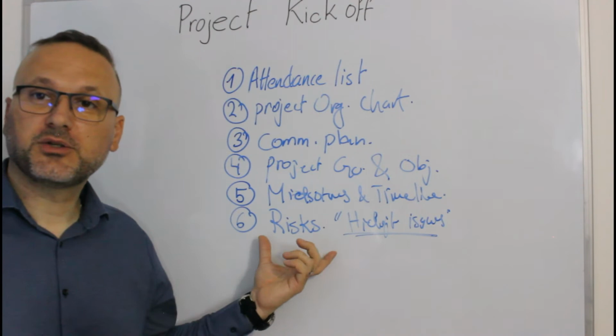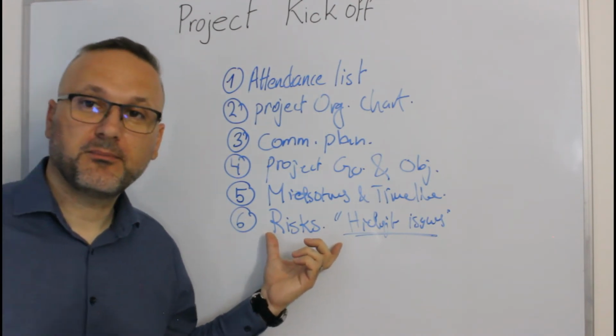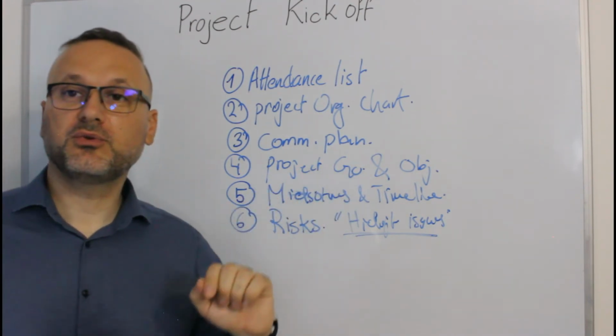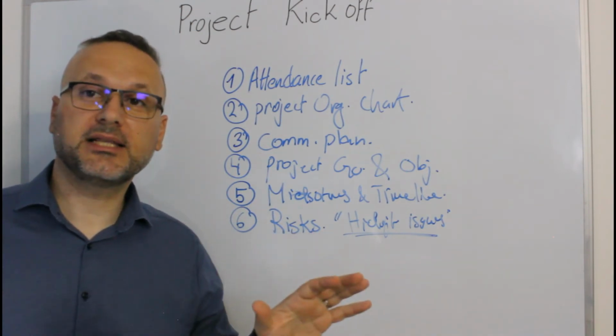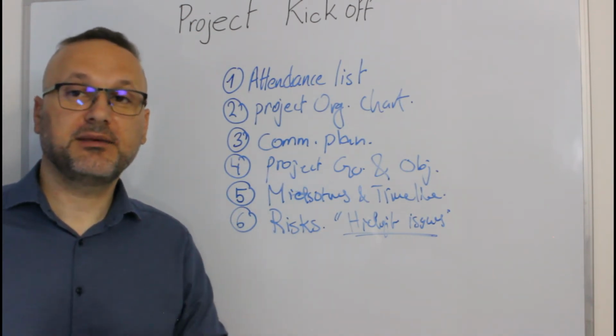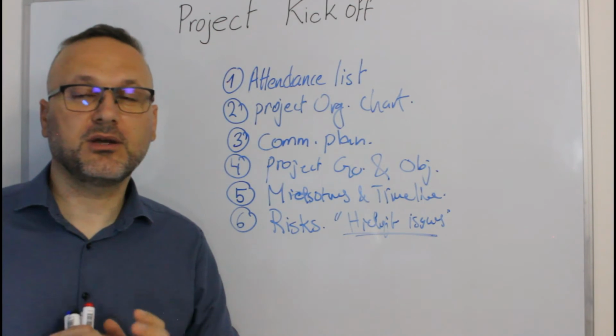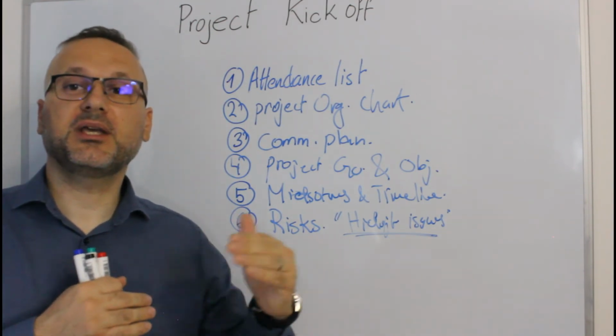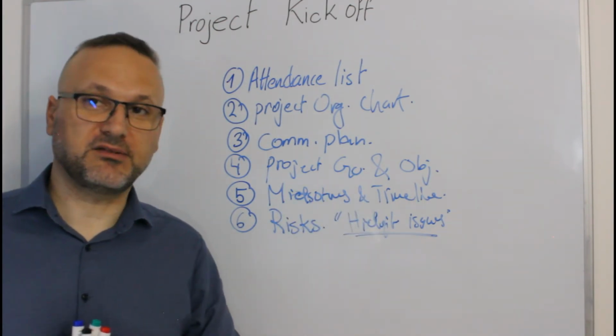So the risks should be agreed, and during the project kickoff, you had to announce the risks which you can see, which you define at the beginning of the project, at the very beginning of the project, because the risk could be increased during the project itself.